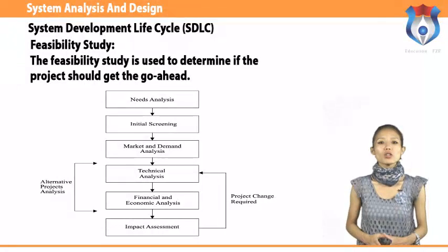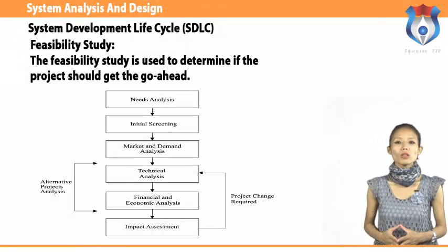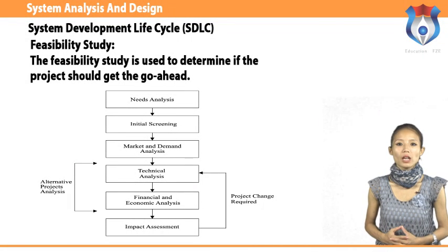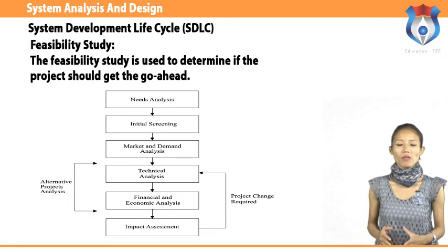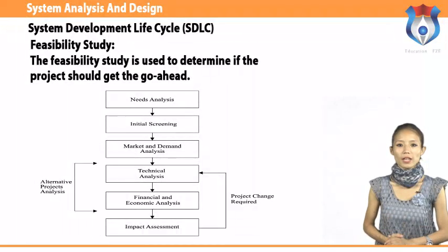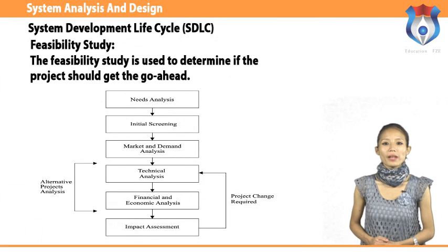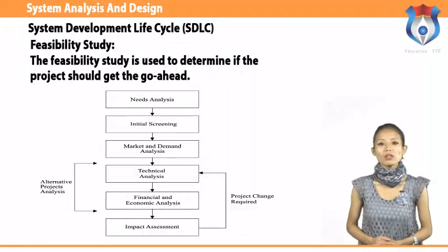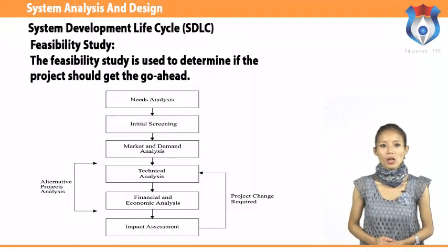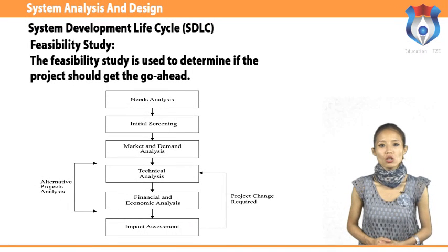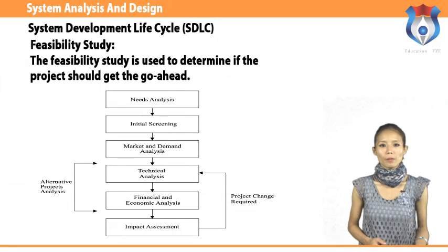The economic questions raised by the analysis during the preliminary investigation are for the purpose of estimating the following: the cost of conducting a full system investigation, the cost of hardware and software for the class of application being considered, the benefits in the form of reduced cost, improved customer service, improved resource utilization, or fewer costly errors.